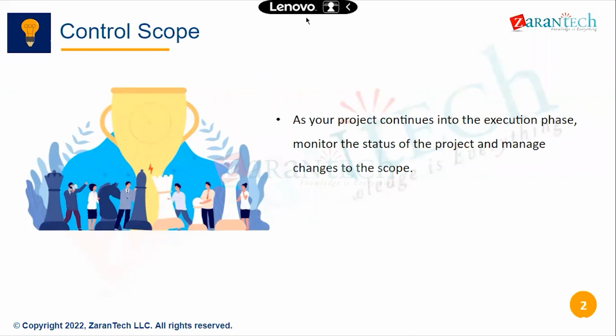Right? There will be a client who is taking decisions related to time and cost. There will be a project manager who is talking about time and cost, and also timelines, like impact analysis. As a BA, you are giving that, and as an architect, you are telling the technical feasibility. And then the change control board chairperson is like the client who is taking decisions related to cost or time. Then if it is approved, and you are able to implement it in the current release, then you give it to developers, let them develop it, and then let the testers test it, then update the documentation, then release to the customers.